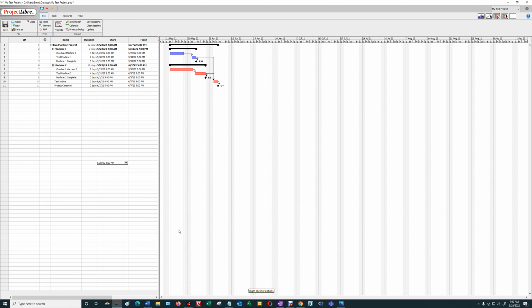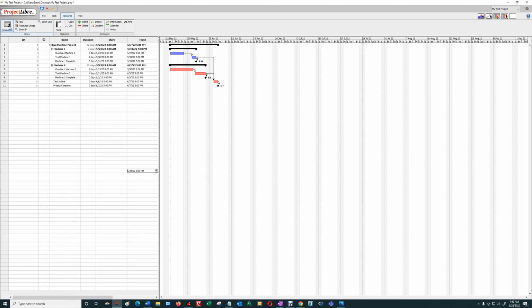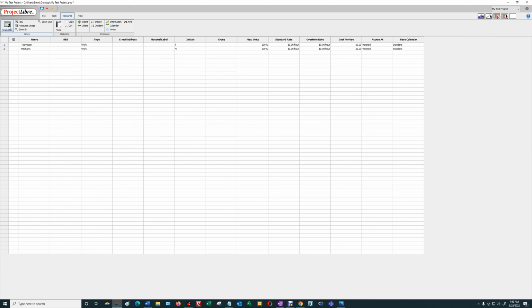Okay, in this video I'm going to show you how to add resources and get a total budget for your project. So we have our schedule already here. We've got our critical path noted. We don't really have a schedule until we have added our resources to it. So what we have to do here, because we have to make sure that resources aren't over allocated, like working in two places at the same time, for example. So what we do is we go to resource and we go to the resources tab right here.